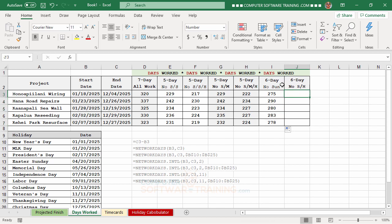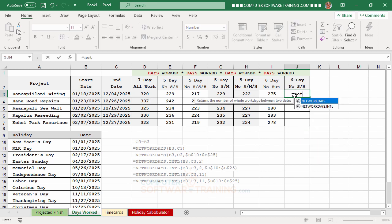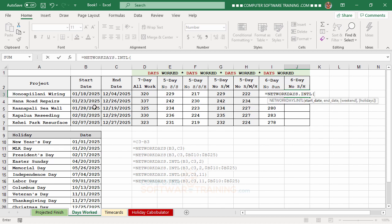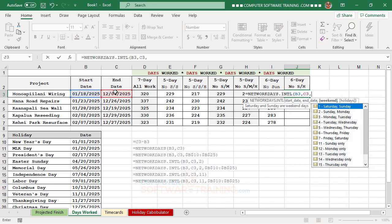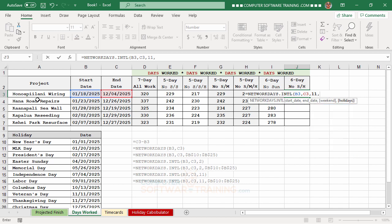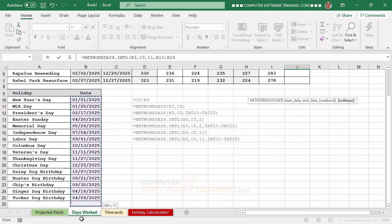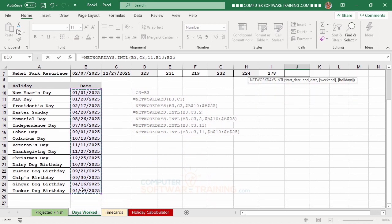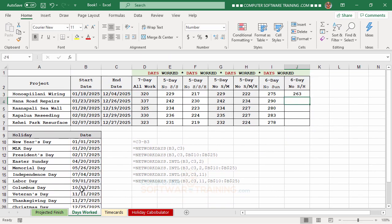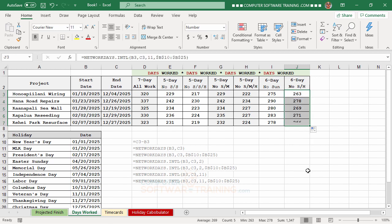The very last column is the same Monday-through-Saturday schedule but also excludes holidays. The formula is: equal, NETWORKDAYS.INTL, start date, comma, end date, comma, 11, comma, then select the holiday range, press F4 to make it absolute, press Enter, and copy down.